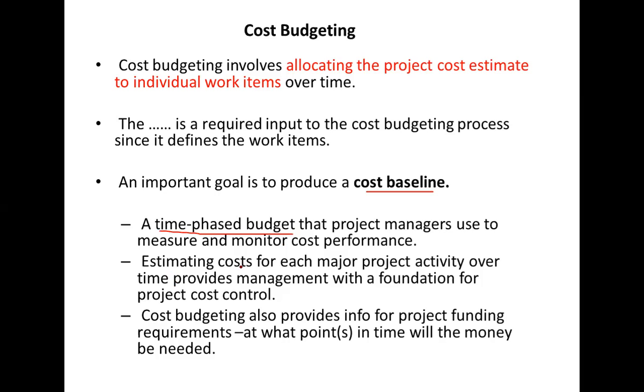So estimating cost for each major project activity over time would provide a foundation for cost control. So we can look at this time, we should have spent this much money of the project. At this time, we should have spent this much cost of the project. So likewise, we have to estimate costs for each major project activity over time.